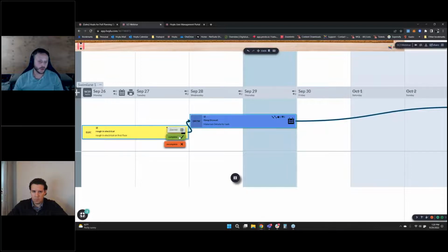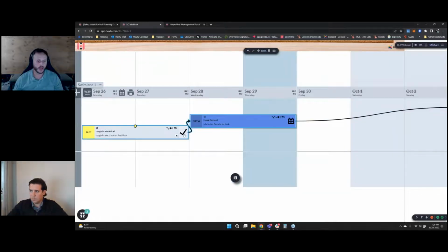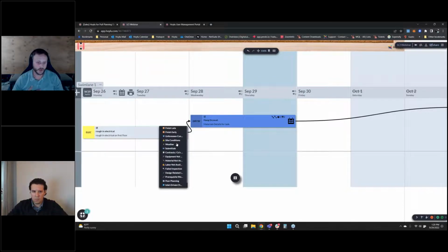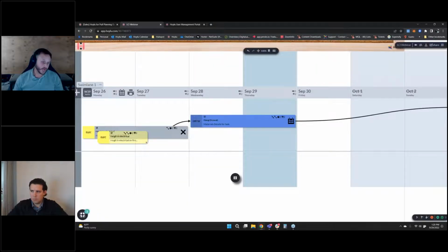So if I mark it as complete, great, right? We get the nice check mark, we're good to go, and you can see we have 50% PPC for the week. We're doing great. However, as we know, things don't always go according to plan, so I'm going to mark this as incomplete. And as you can tell from my cough, maybe I'm sick, and I have COVID or something, and labor is not available. So I'll mark it as labor not available. And now that variance reason will be attached to this ticket if I were to open it up and take a look at why it was marked as incomplete.